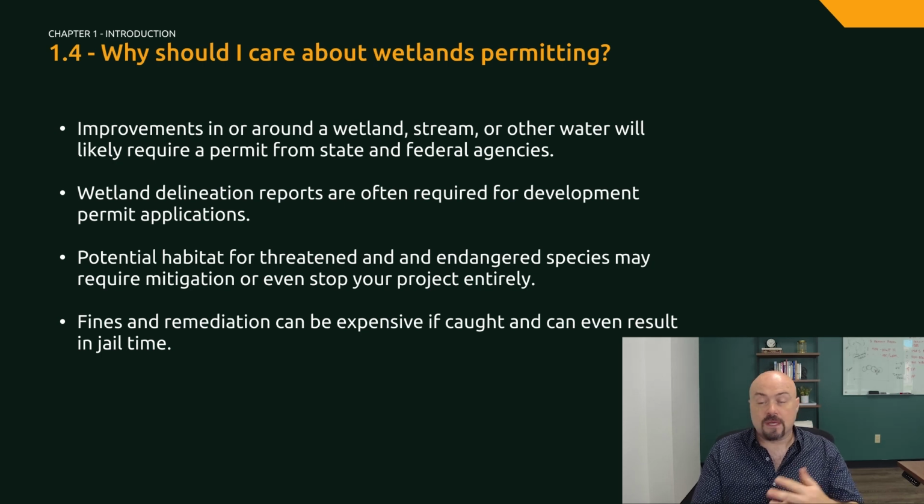These local governments also have to follow state and federal laws. So if there is any potential habitat for plant or wildlife species or wetlands that are on your property that might be governed by a federal or state law, then they are going to want you to study it before they will give you an approval.